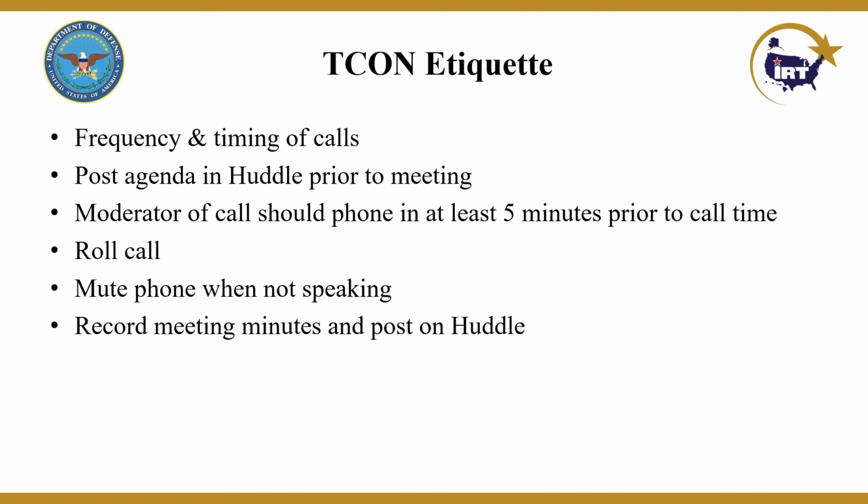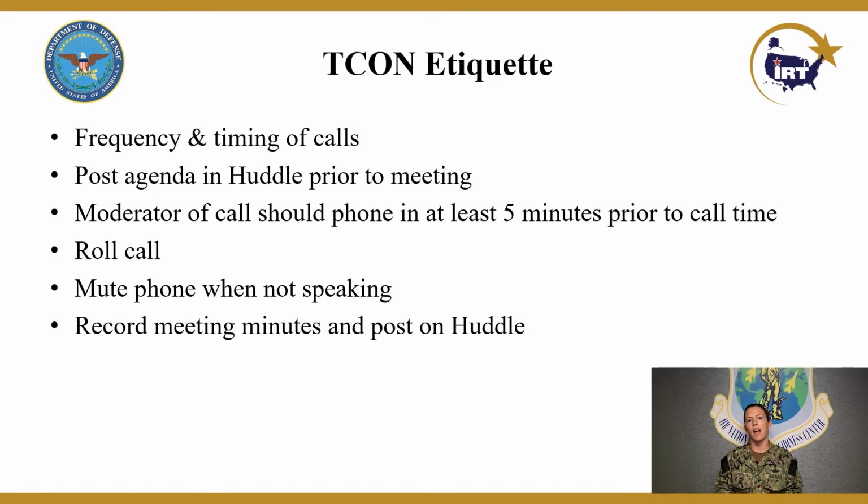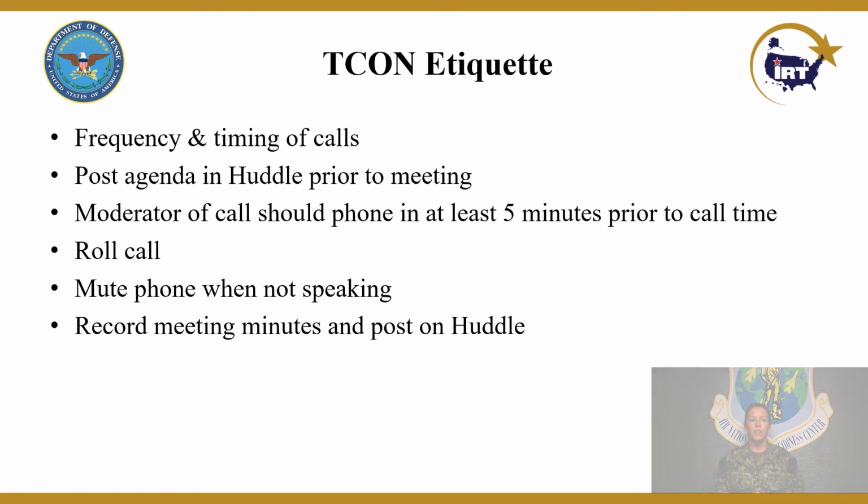And then again, record meeting minutes and post them on Huddle. So for every call, in every meeting, you should be posting minutes in Huddle, so anyone who's not able to attend can go through the meeting minutes and see if there's anything that they need to do or next step actions that they need to do prior to the next meeting. And the next step actions should be included in your meeting minutes so people know what's next. Next slide.